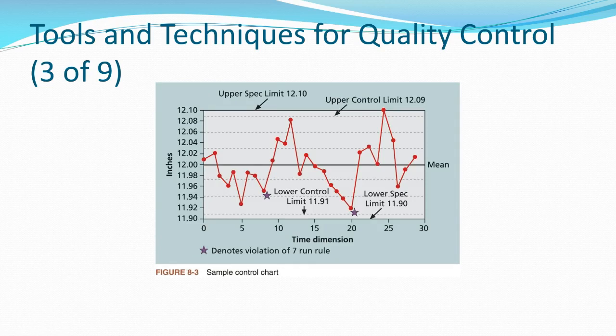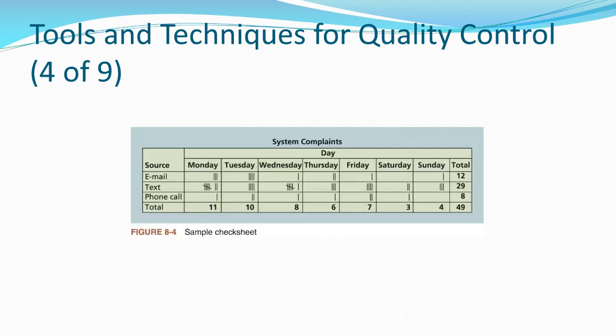We may also have upper and lower limits. For example, it may be acceptable to have a latency on a network card of plus or minus three milliseconds delay. What's the upper and lower limit still acceptable for maintaining quality? If we go above those layers of latency, we may see slow access to the internet or a system. It's the same with tolerances — what are the upper and lower weight-bearing limits of a piece of steel's ability to bend? We might also track complaints per day — for example, ensuring no more than three dissatisfied customers per day. Quality can go into non-technical aspects as well.